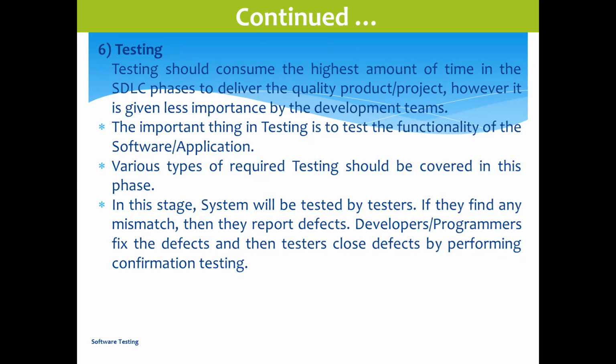Suppose for your requirement you got 20 days. You have to complete in 20 days and deliver, and the release will happen. So 50-50, 10 days, 10 days. The 10 days up to stage 5 are all planning phase for you. In those 10 days you can understand the requirement, then write the scenarios and review them, then write the test cases, review, and if there is any comment, update that. If any data is required, prepare that data using queries or code or something, then make the environment ready. After that, once it is confirmed by the development team, you can start your actual execution practically.